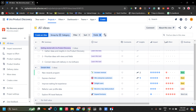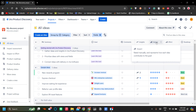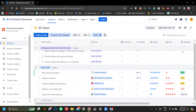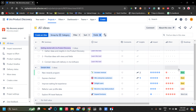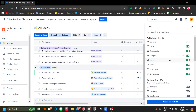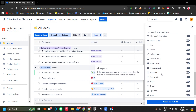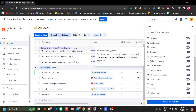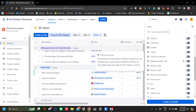Next is impact and effort, and roadmap. All of these columns and rows are customizable in Jira. The reason you'd want to add the impact and effort bar chart is to compare the impact versus the effort required to put out a new feature. For example, the 'New Rewards Program' has very high impact and requires little effort. From those two considerations, you can decide your priorities. You can also add fields like impact score, a short description, or customer segments.